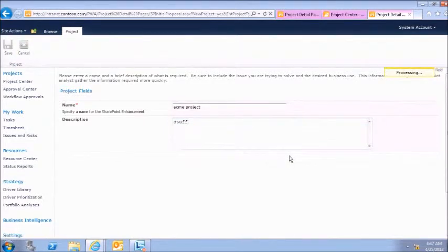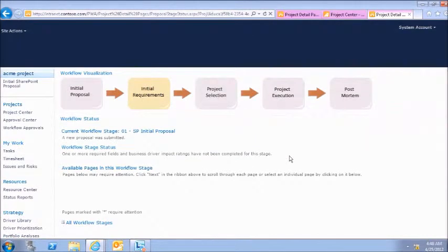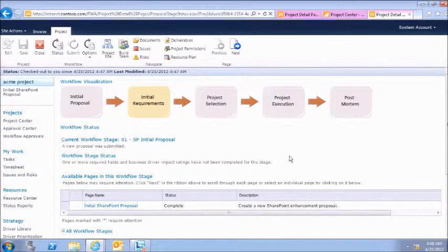Okay. Now what you're going to see is there's a whole bunch of stuff going off in the right hand side there, because it's doing a number of things at this point in time. As I say that, we're triggering off some workflow, and the workflow is going to do essentially 3 things. Within that template is a project plan, a classic project plan that most of you have seen, an MPP type file. And it's taking the tasks from that MPP file and it's placing them into the SQL database that is connected to this project server. So it's taking it from a freestanding project and making it into an enterprise project.